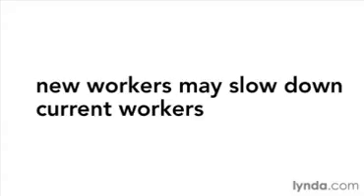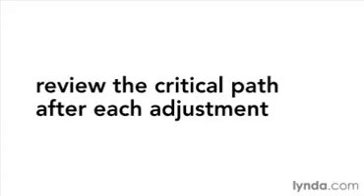Whether you fast track or crash, keep in mind that the critical path can change. Some tasks might become non-critical, and others may turn into critical tasks. Be sure to review the critical path after every adjustment to make sure the next task you work on is still on the critical path.